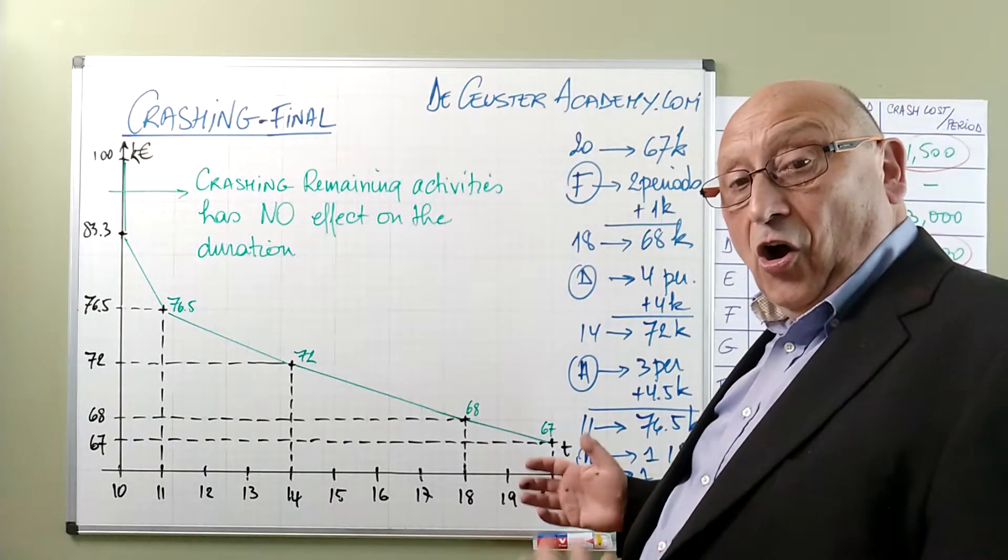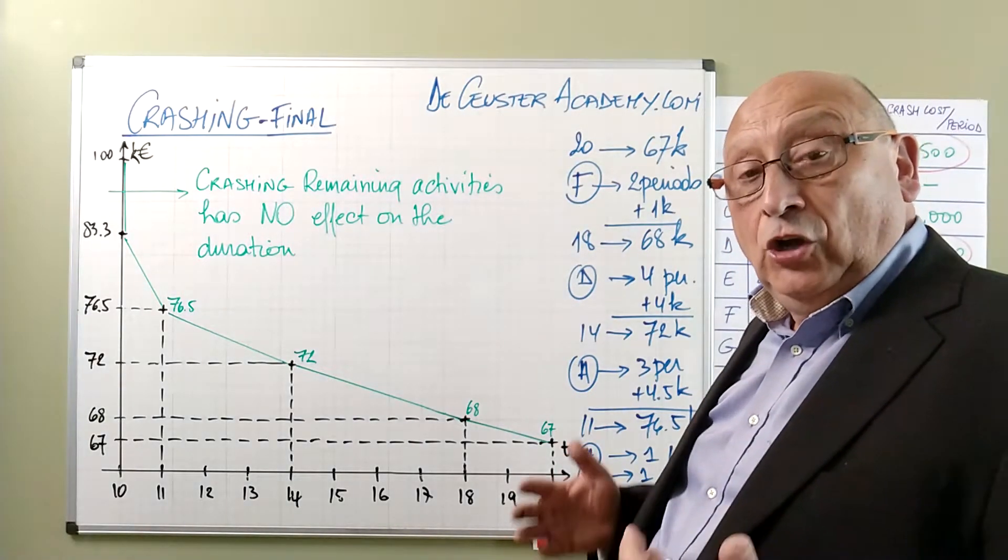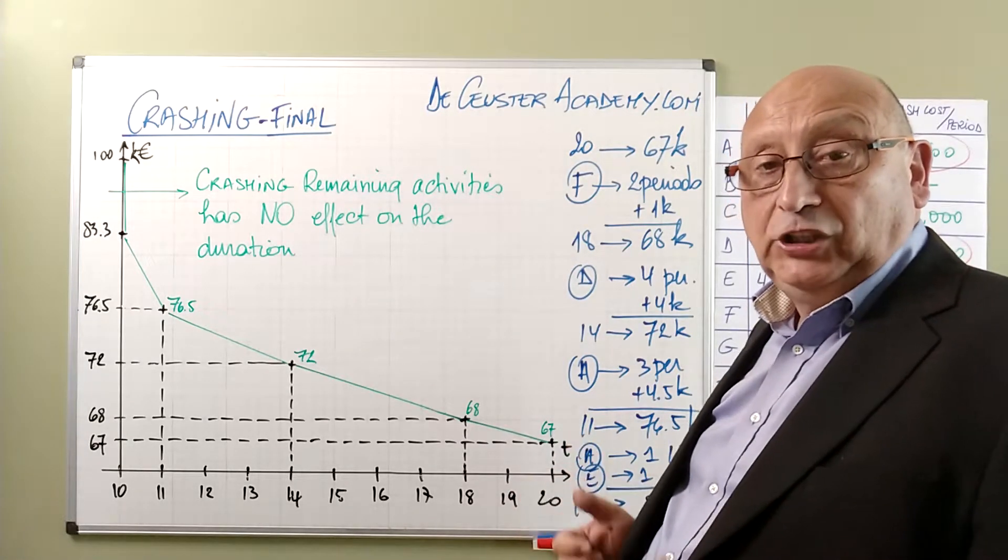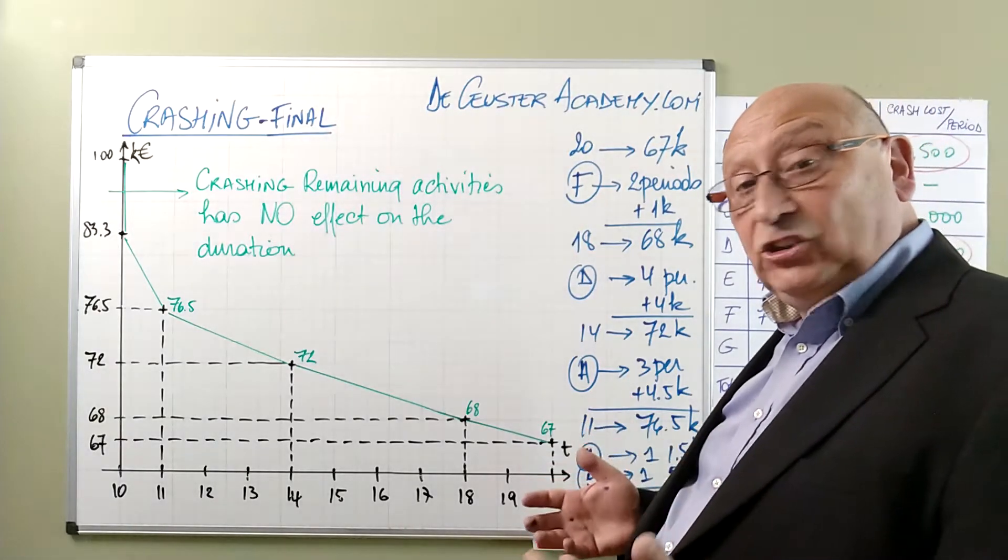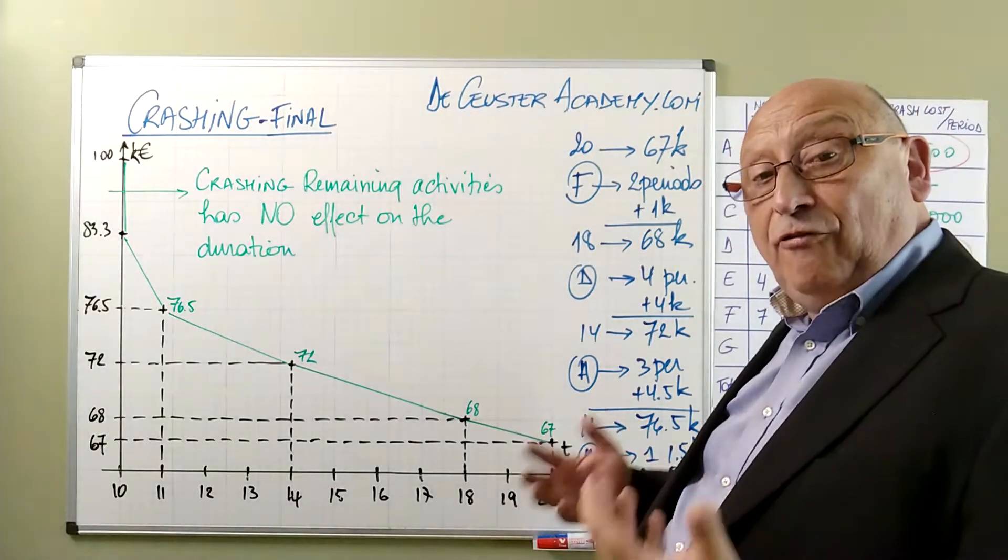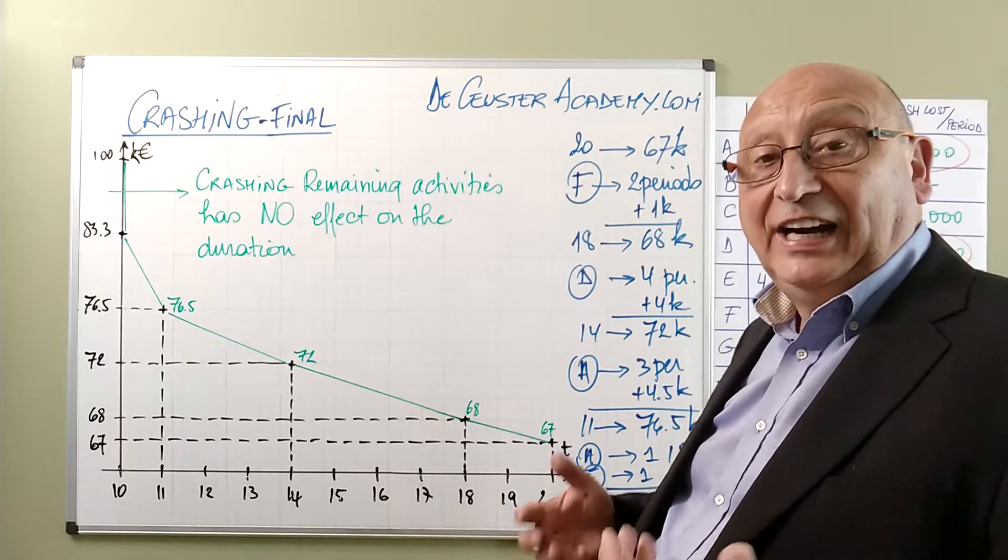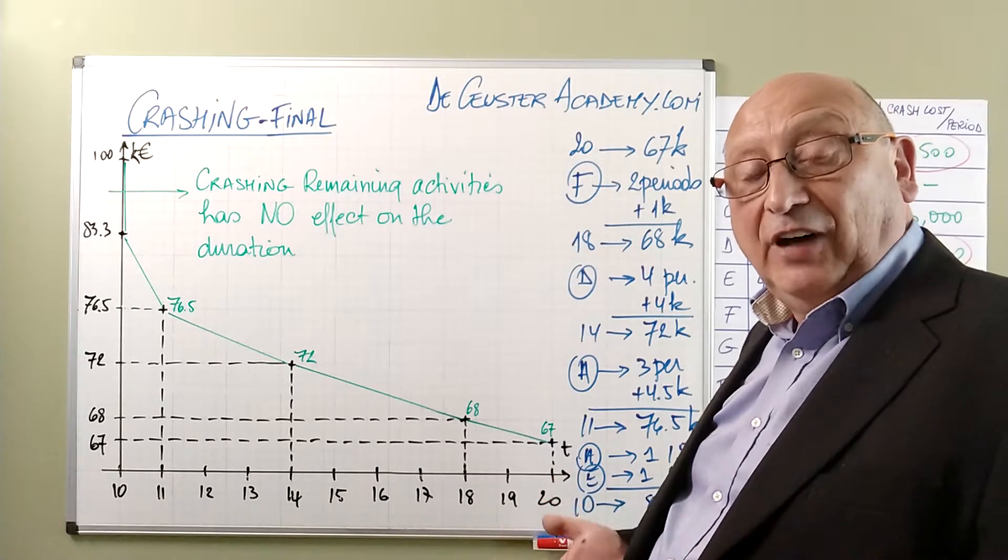The more we crash, the more expensive the project will be. But we also see that once we crash up to 10 periods, further crashing the remaining activities, the ones that we didn't crash yet, will not give any extra advantage. It will only create slack on the other parts which are not critical anymore.